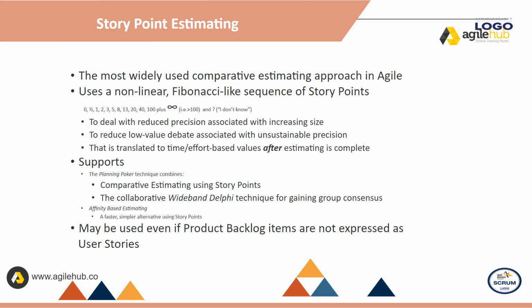Supports. The planning poker technique combines comparative estimating using story points and the collaborative wideband Delphi technique for gaining group consensus. Affinity-based estimating is a faster, simpler alternative using story points. Story point estimating may be used even if product backlog items are not expressed as user stories.